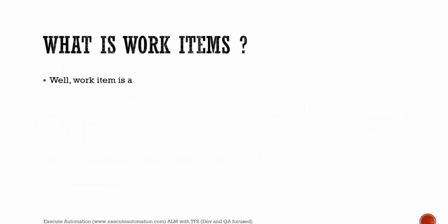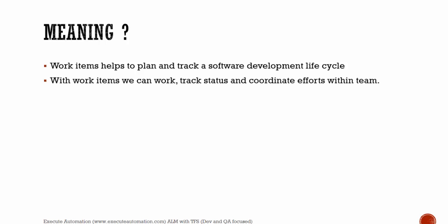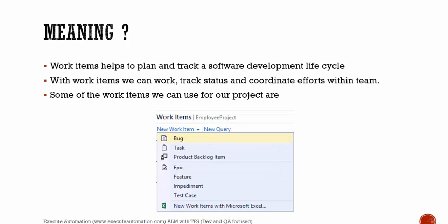What is work items? Work items help to plan and track a software development lifecycle. With work items, we can track status and coordinate efforts within a team. Some of the work items we can use for our projects are: you can create a bug, you can create a task, you can create product backlog items which are essentially requirements, and you can create epics, features, impediments, test cases, etc.